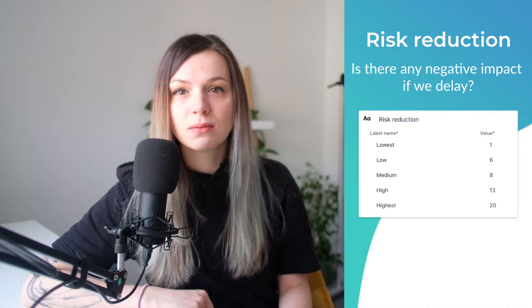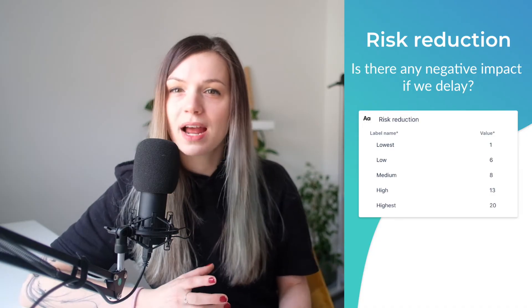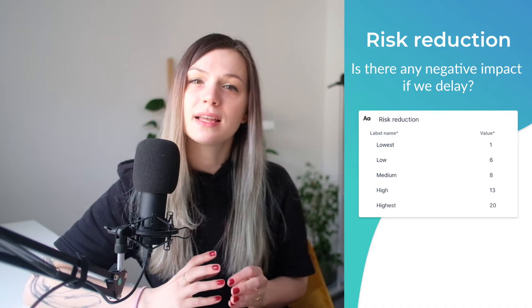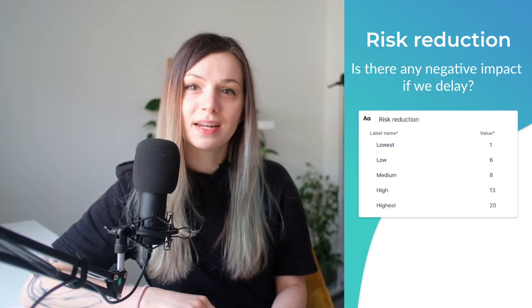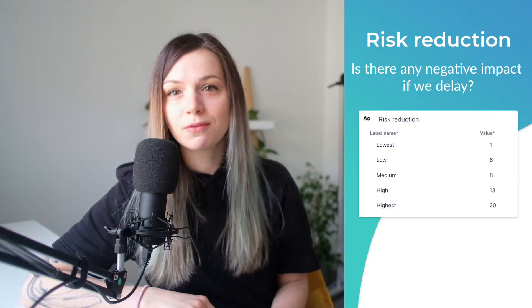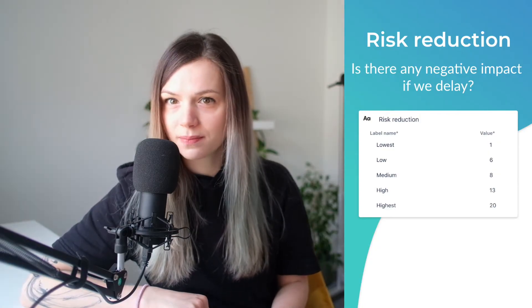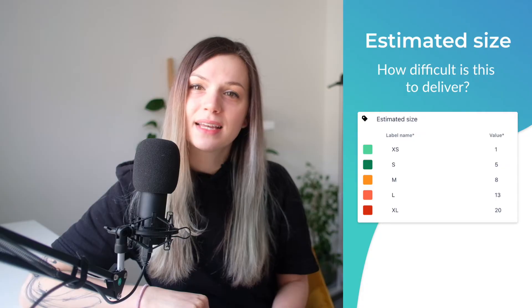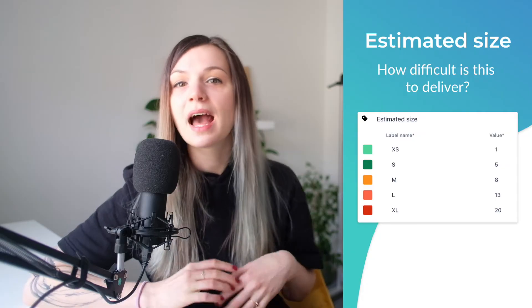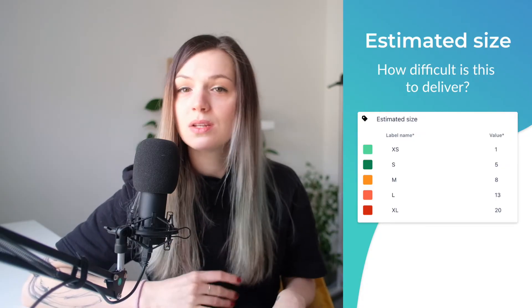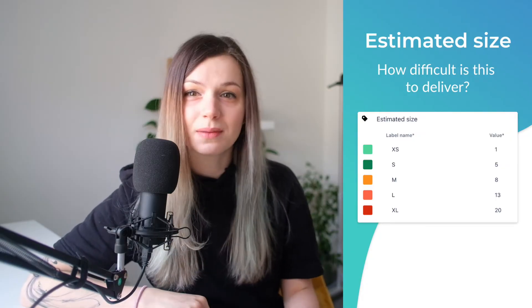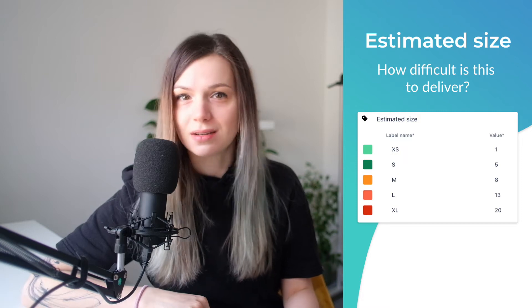The third metric is risk reduction. With risk reduction, we are assessing if there is any negative impact if we delay this task, and assign risk level from lowest to highest. The last metric is estimated size. Here we are asking how difficult it is to deliver the task. You can use t-shirt size estimation to make it easier for your team.